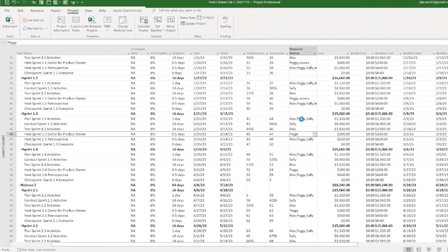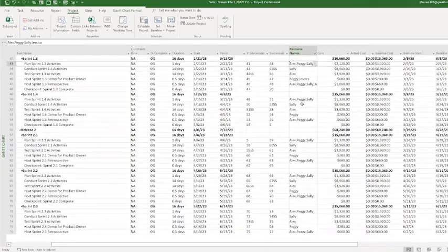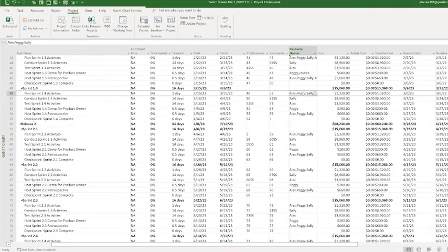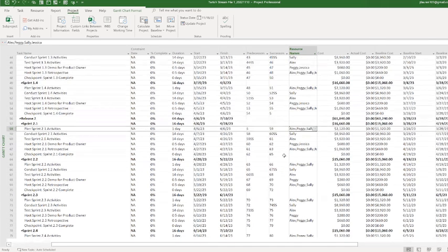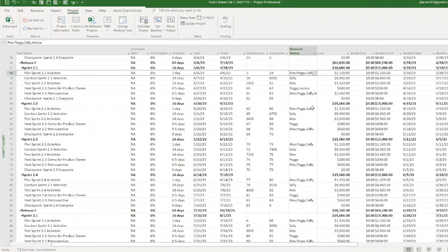Now here's the other thing about Microsoft Project I'm also going to add. If you save your file, you can't undo anything you've done after you saved. So you gotta make sure you undo any mistakes, or any things that were kind of a misstep. See, like it will ask you. So I'm going to not save it for the moment because I want to make sure that I get Jessica built into all these other pieces, right?